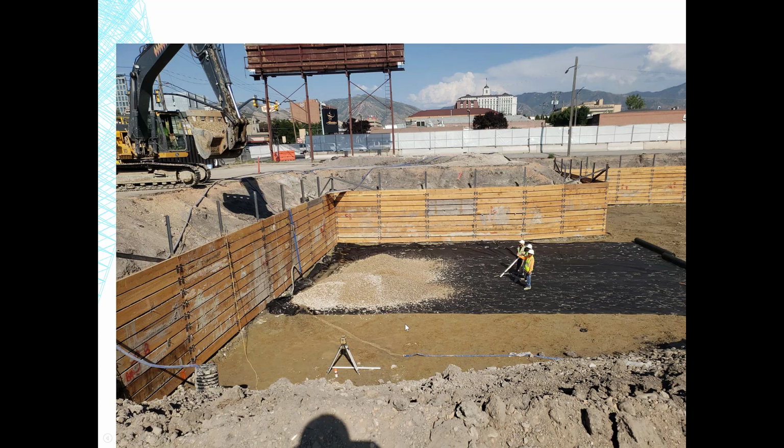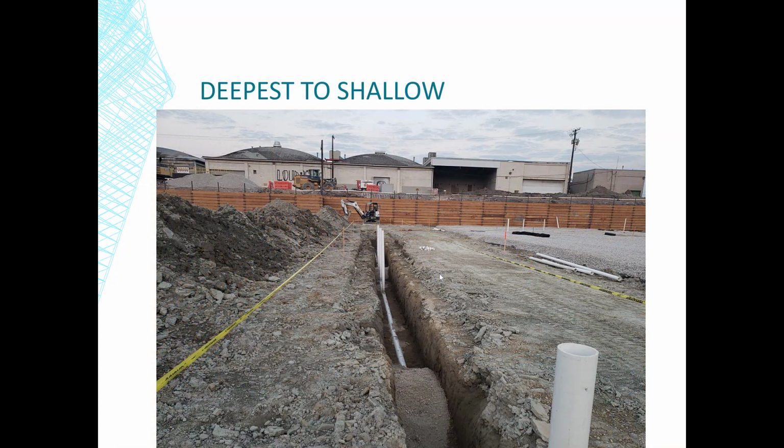We're down to the lowest part of the building right here in this area. The first thing that this building is going to get is a bunch of gravel, and then a concrete floor, a big concrete mat footing. It's going to act as the floor as well, a garage basement. You can see the Mirafi between the two, and then you can see a bunch of gravel, and then the concrete's going to be on top of that.